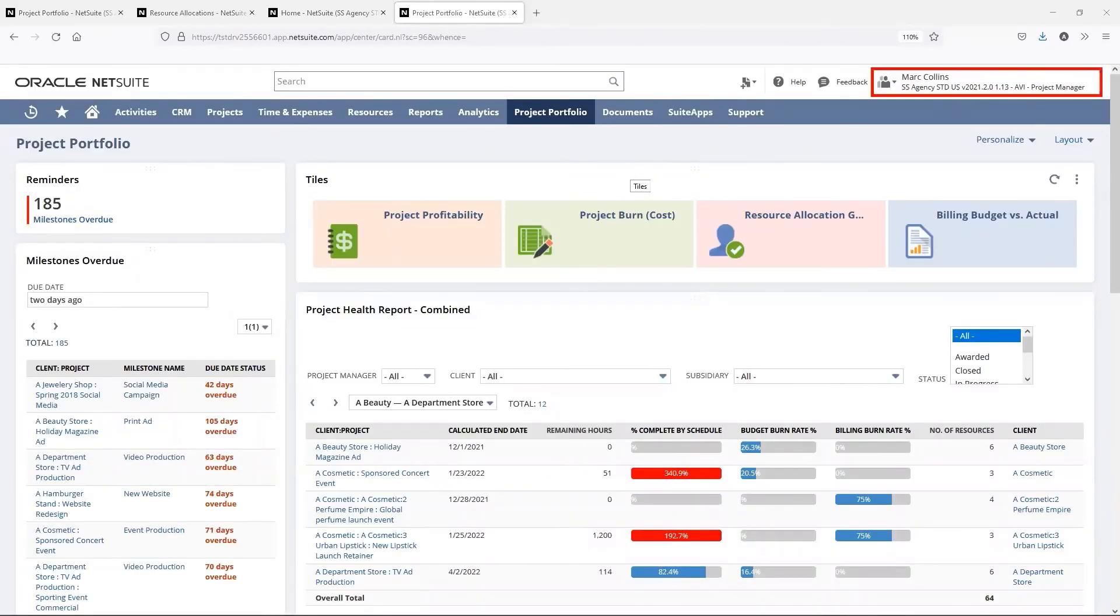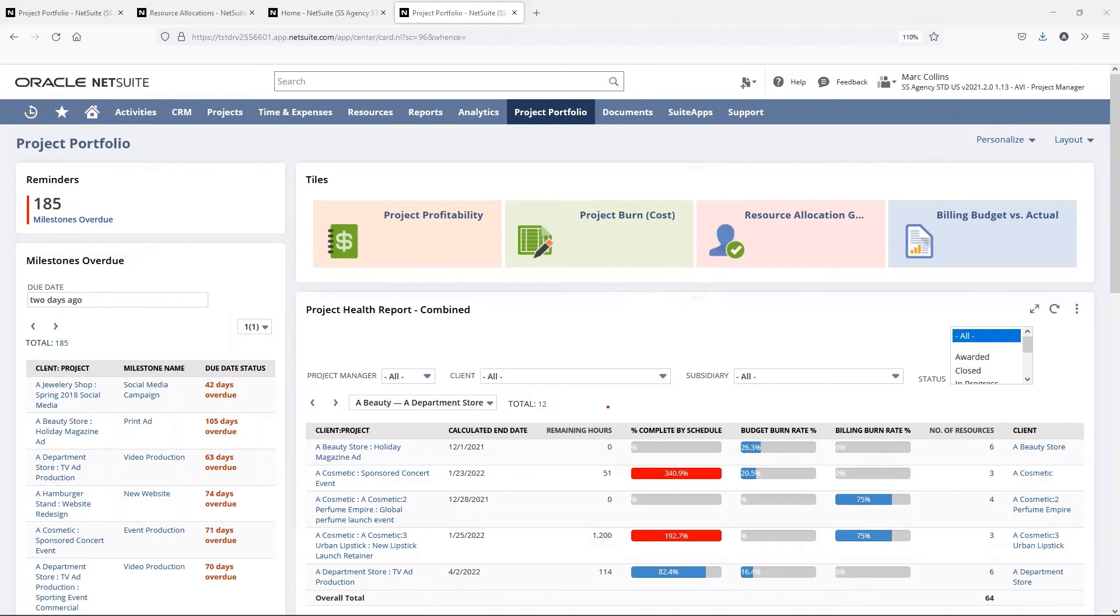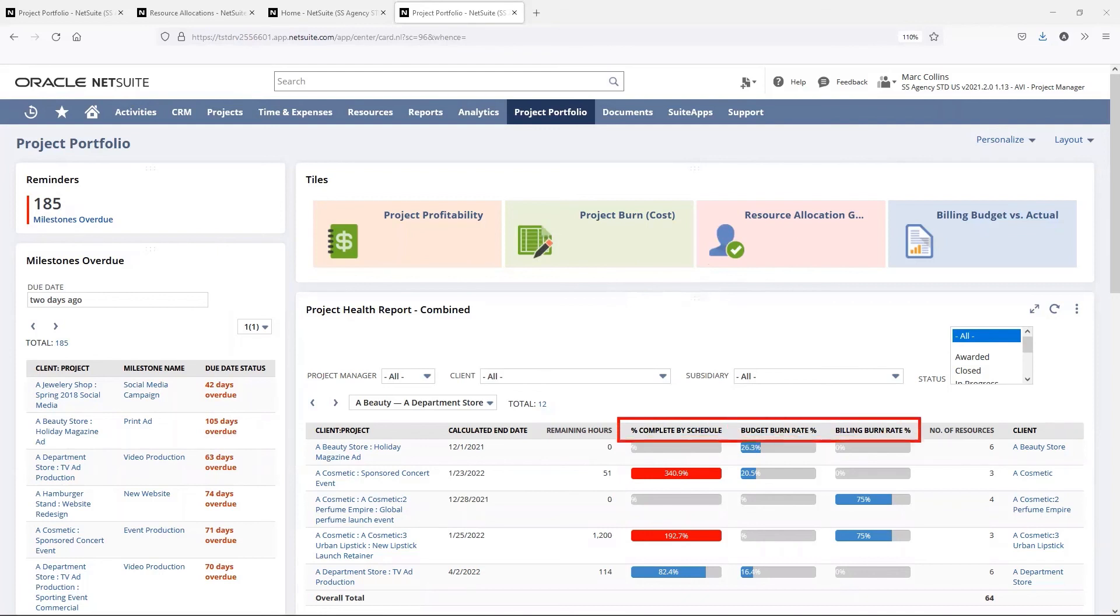Now, let's switch over to our project manager role to see the impact of these timesheets and expenses that have been entered against the project. Right on the dashboard, we can see the immediate impact of the work being completed against the portfolio of work. This will include the percentage complete by schedule, the budget burn rate percentage, as well as the billing burn rate percentage.